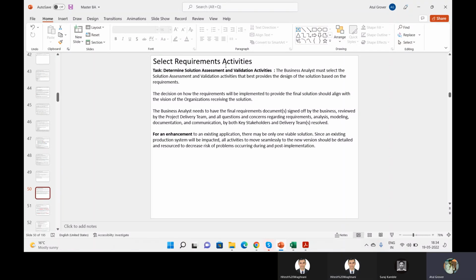So let me take an example. I was working with one of the value streams, and during the BRP they put 7 stories in 1 sprint. I know that after 2 weeks my sprint is going to start. On day 1 in the previous sprint, I sent an email to my value stream guys: these stories I'm interested in taking into the next sprint. Could you please provide me the exact requirement, or if any refinement is required, let me know.